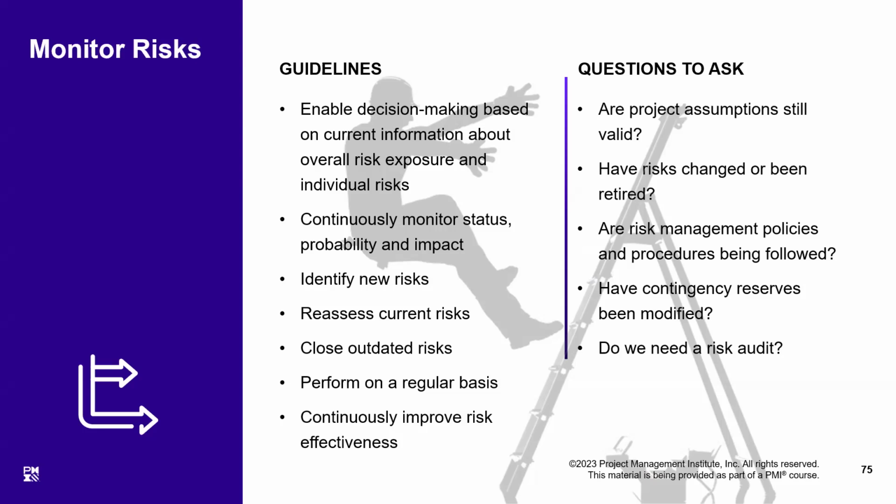Therefore, it is our responsibility during monitoring to keep asking this question: has any project assumption been converted into a fact or proven wrong? If any assumption has proven wrong, we must be warned immediately that this might become a risk.